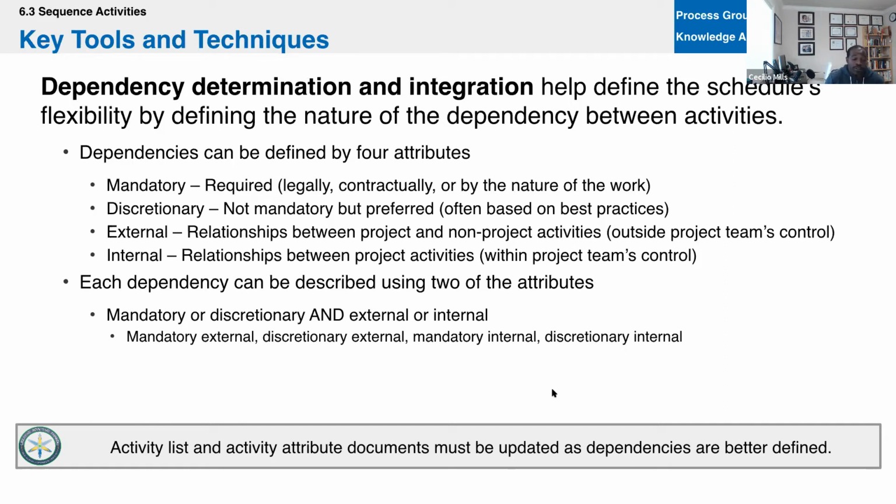All right. Then you have discretionary dependency. It's your decision. It's your order. However you want to do it. The best way I describe this one is some of you put your pants on, and then you put your socks on and you put your shoes on. Some of you put your socks on, then you put your pants on, and then you put your shoes on. Right? And if you're my grandfather, he's the guy that puts his socks on, his shoes on, and then he puts his pants on over his shoes, because his clothes have to be so perfect. He's still one of those, and does this and looks in the mirror. But right, that's his discretion. And that's the idea on the exam that you'll see, right? So it's just whatever order you want.